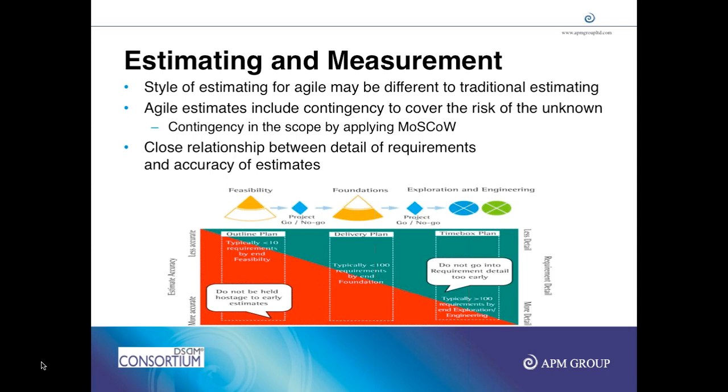So it gives you a ballpark estimate, something that you can use as a starting point to decide: are you willing to spend this much money? Are you willing to spend this much effort and time to deliver the product? So it gives you an idea to start with. But as you do more planning, as you do some work, you can go and check your previous estimates, and you can then start making better estimates about your plan. Time boxes also help us check our estimates and plan the next time box using how teams performed in the previous time box.